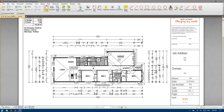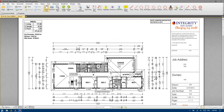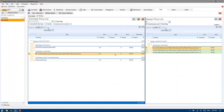If it was a H1 or an S or anything lower, then we would only be putting in the area of the living and garage. Because our preferred construction method is to pour after the fact and not pour in situ — we find it to be a lot cheaper than putting waffles in and pouring it as part of the house slab. So 137.42.